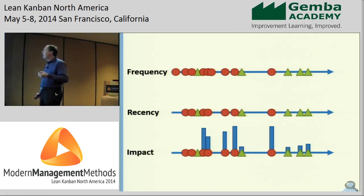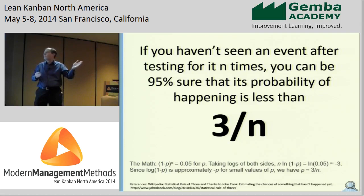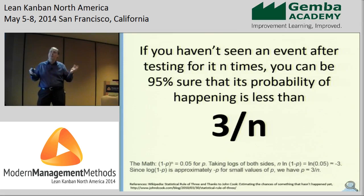One thing you need to know: if we think we've fixed a root cause, how many stories have to pass through before we're 95% certain that we actually have fixed it? This should be something you're very interested in. Whenever you think you have a risk and you've chosen to monitor it, how quickly should you be confident it's not going to occur? This happens in medical research when you're trying to work out side effects for drugs.